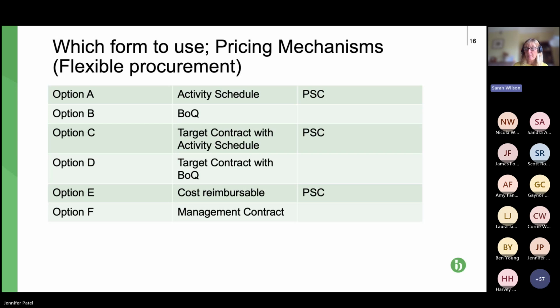So if you think about it, your fixed price is to carry out the work in the scope, stroke works information. The salami slicing of it, the listing the items and the price for individual items is only to facilitate the payment. So we can move on to the next slide, please.